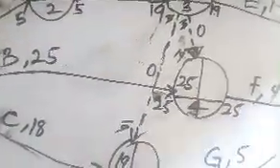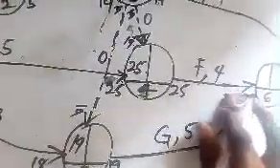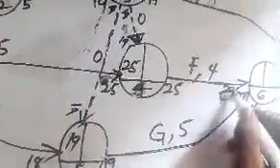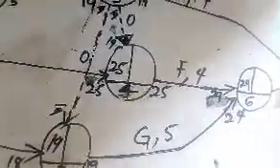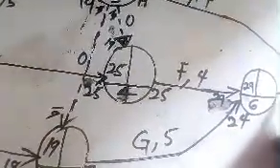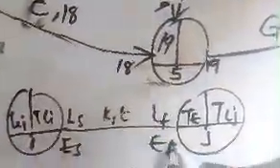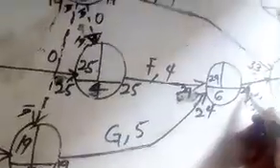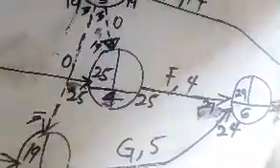25 come out. 25 plus 4, 29. You see, so 29 will enter because 29 is greater than what? 24. So 29 come in. Now 29 will come out. ES, don't forget ES, LS, EF, LF. 29, 29. So 29 plus 5, that is 34.